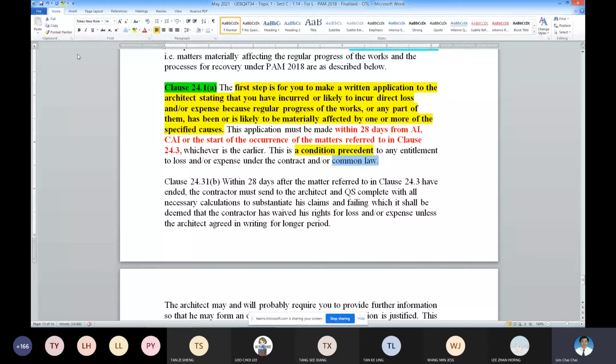Yeah? So your notification for your contractual claim can be used as a notification for your future common law. Okay. Although if you didn't do it, then the common law gives you at least 6 years to get your paperwork done. Okay. If you have done it already, then it will be much easier to pursue under your common law